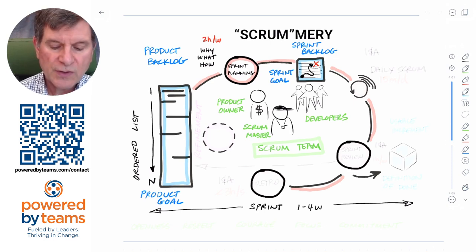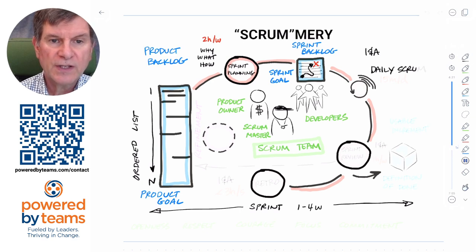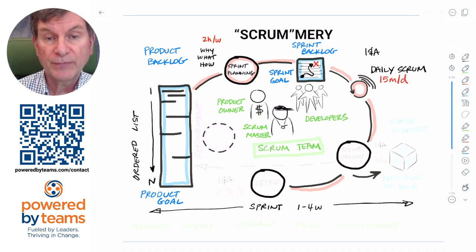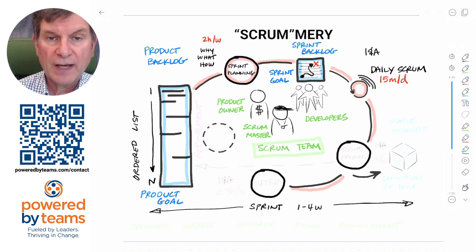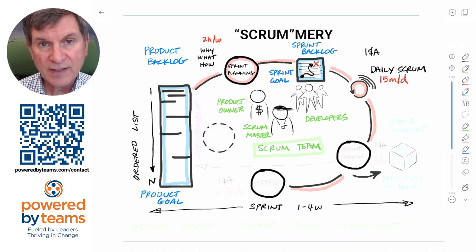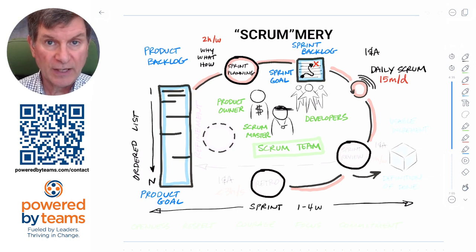Scrum is also a set of nested inspect-and-adapt loops — one focused on the process, one focused on the product. The tightest of these is the event known as the daily Scrum, which is a 15-minute per day planning meeting. It's there for the developers to inspect their progress towards the sprint goal and to adapt their plans for the next day's work. You can get status by listening in, but that's not the purpose — it's actually a planning meeting.